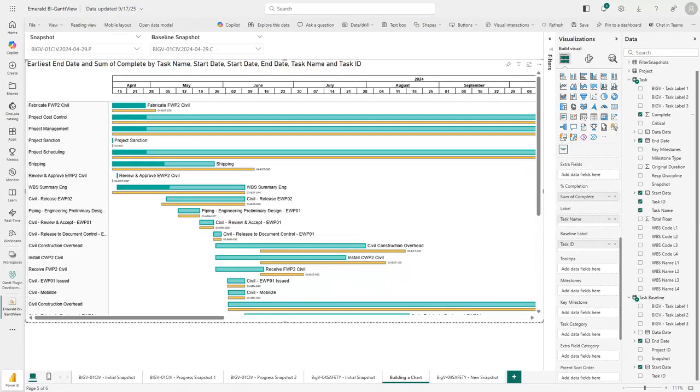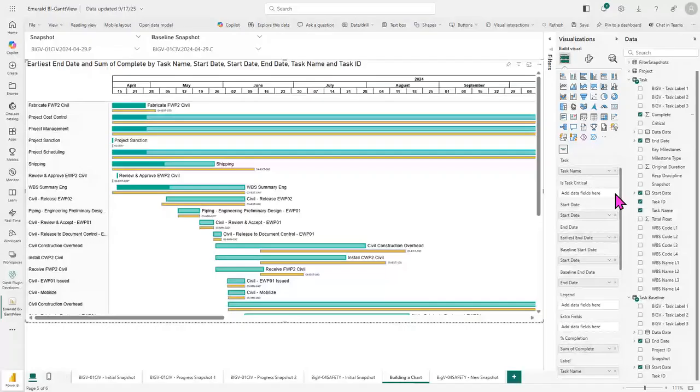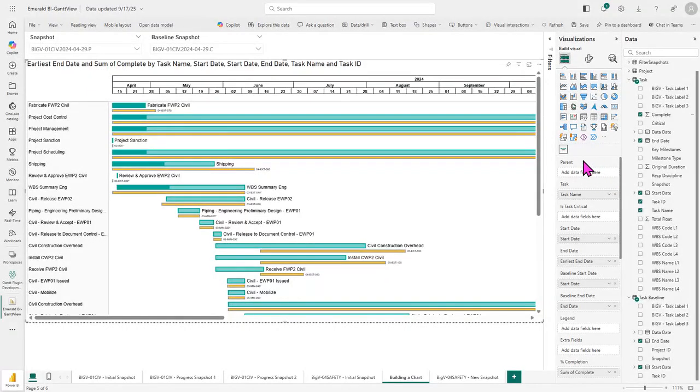So our chart is starting to take shape, but you might notice that our activity table along the left here is looking a little bit flat. So let's fix that by adding a WBS hierarchy. If you scroll up to the top here again, you'll see there is a parent data field. This is where we can choose how we want to create our hierarchy. You can use different types of criteria here, but we're going to demonstrate just a typical WBS hierarchy for this presentation.